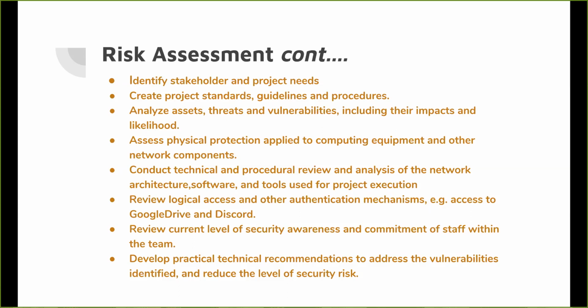We had to analyze our assets, which included the data that we were capturing. That was probably our most valuable asset. We analyzed the threats and vulnerabilities that would potentially occur or did occur during the process of capturing that data, including each asset's risk impact and the likelihood of each of those risk impacts.